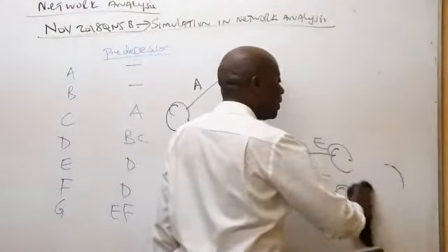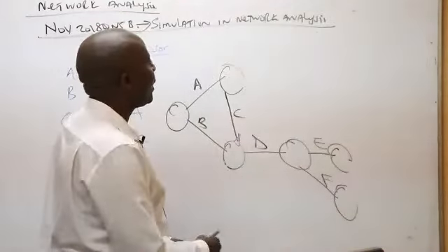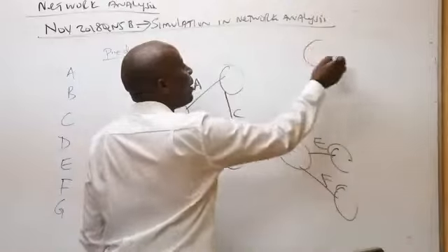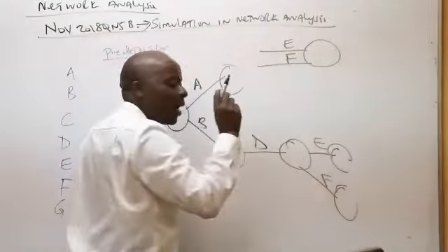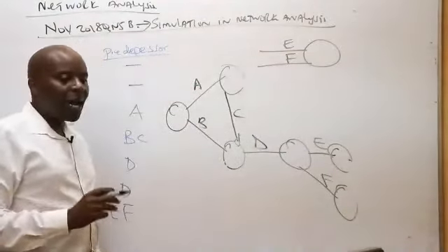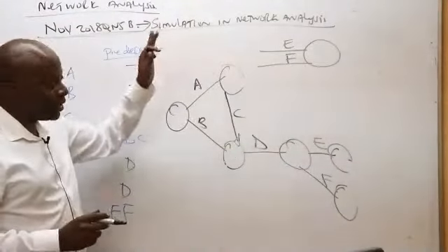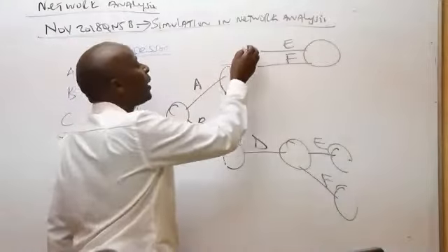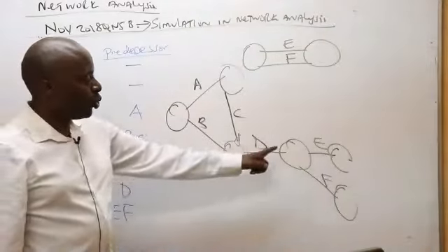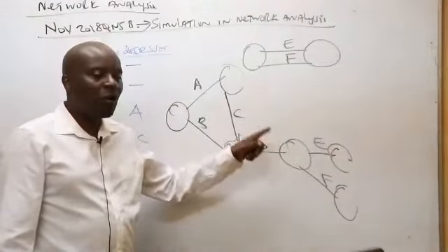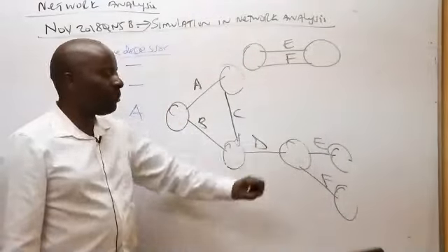Our aim, ladies and gentlemen, is to ensure that E and F are going to end together. And as James is telling us, I wouldn't have had any problem if E and F were to end together directly there. But now there is an issue that the two again shared a common start. The two, E and F, have shared the same common start, the same starting point.